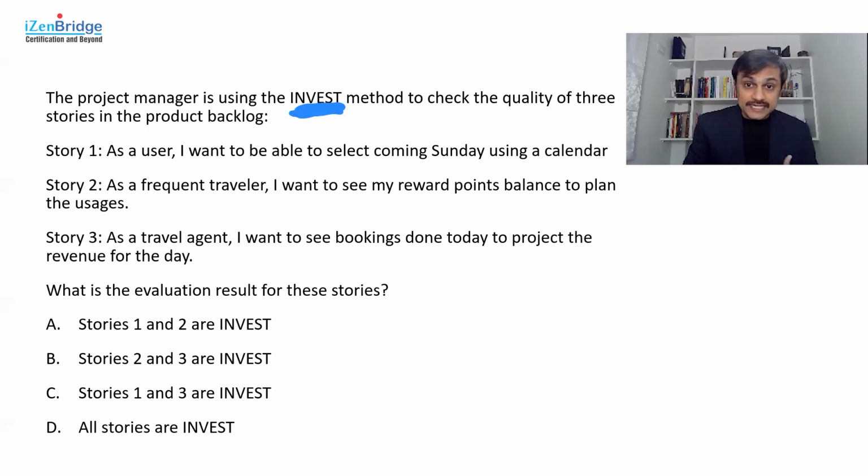I stands for independent, which means that the story should be, as far as possible, independent. It can be evaluated end to end by just looking at this user story. Sometimes you may not have an independent user story, but you should always aspire to have independent user stories.